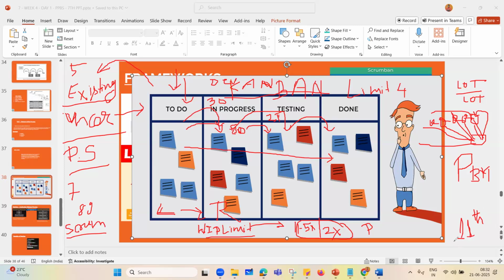So when it was updated, what I was going to refer to just slipped from my mind. Okay, on 11 June 2025, the Scrum expansion pack was introduced. They added multiple things into that. What they say is that every column will have its own done practices. It means developers will mark their work as done, and then they don't need to assign. So there will be done criteria in progress. If development is in progress, then development done can be another column, and it can be created in Jira or Azure DevOps, like a project management tool.